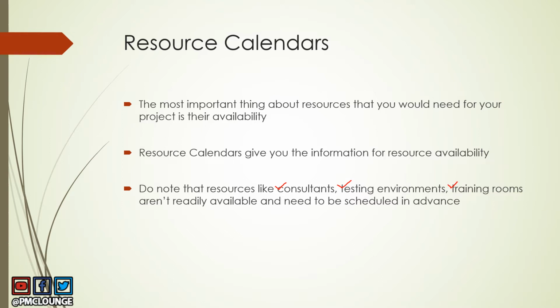Your project team could be something which is readily available, but a testing environment is something which might not be readily available, and you need to schedule these kind of resources in advance. And that's the reason you need to know when these resources are available so that you can create a schedule for your project.